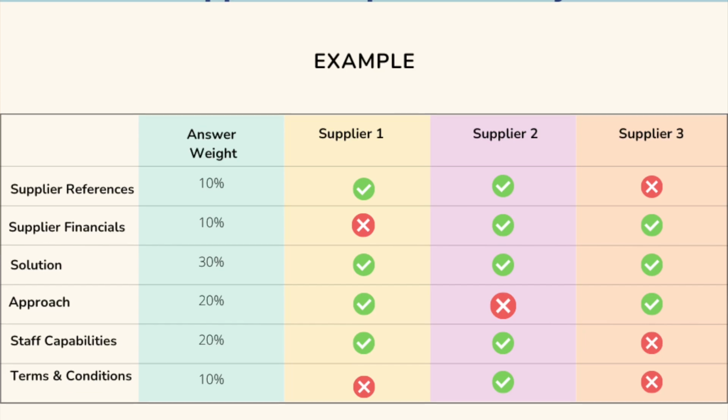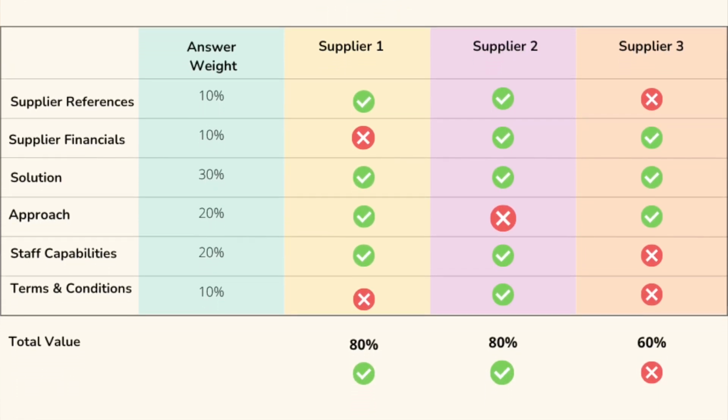Now you've gone through the RFP process, and again, you need to have some rigor here. You've gotten all your answers back, and you want to create something like an Excel spreadsheet where each answer has 2 values. 1 of did they answer it, and 2, the weight of that answer. In other words, how well did they answer it? How much does it match your requirements as a supplier? Once you've gone through all of that, you should end up with something like this. On paper, you know about this company. Next is meeting them face to face.